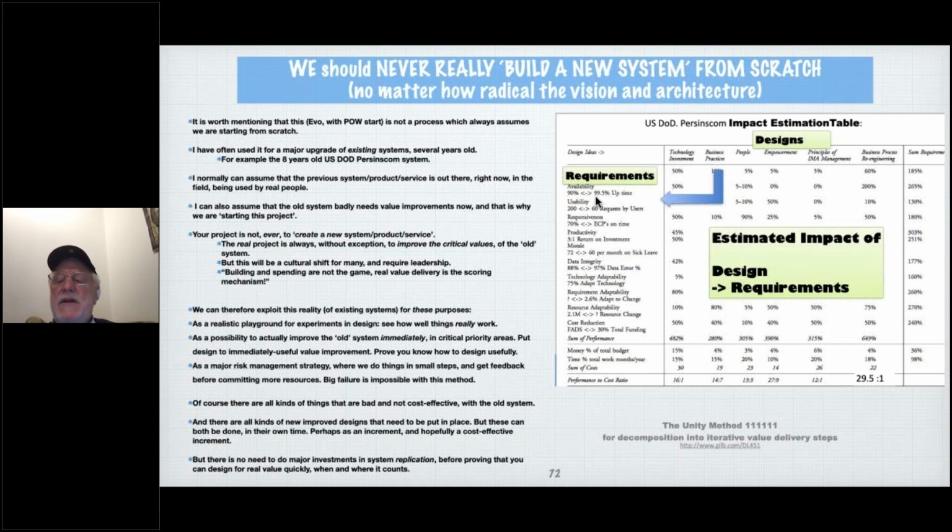What they did is a whole case study, which you can find down here in detail, but they did the 1-week startup, which is why I'm showing you this slide. And on the first day, they took their values, which are listed here, and they numerically said how much better they wanted each one to be. On Tuesday, they named all these different things like business process reengineering and technology investment as high-level architectures. On Wednesday, they built this table with the value estimates and the cost estimates.